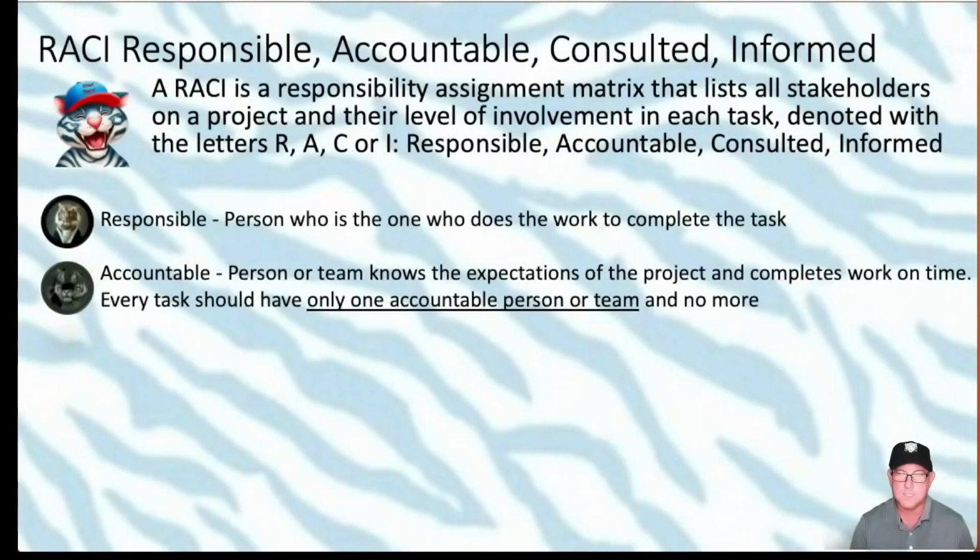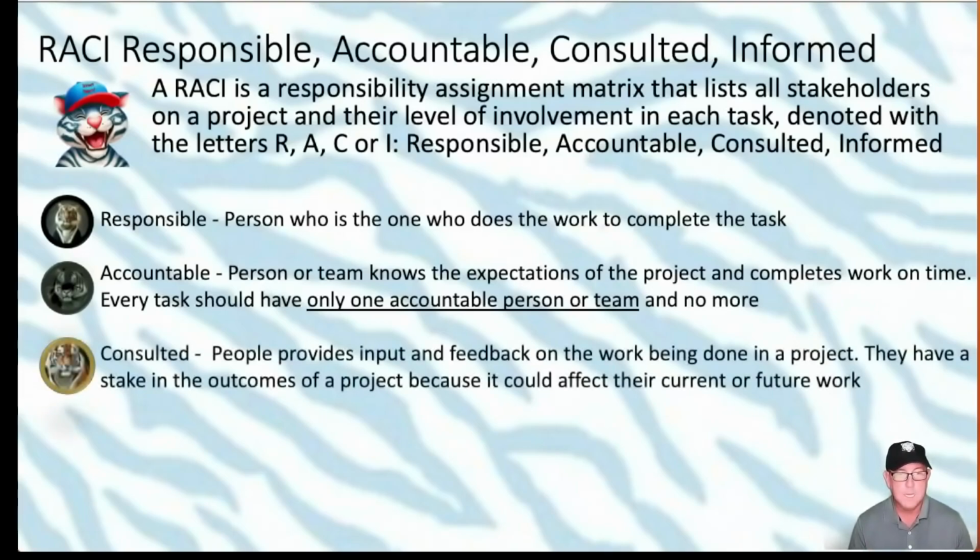Now, the hard thing to do is you need to go by this rule as much as possible. Every task could only have one person or one team accountable and no more. Or there is this huge diffusion of responsibility and it's tough to get things done. There's a consultant. So these are people possibly in other teams, like operations for example, and you really want their input and feedback because when you hand it off to that operations team, for example, it's going to affect the work they have to do in the future.